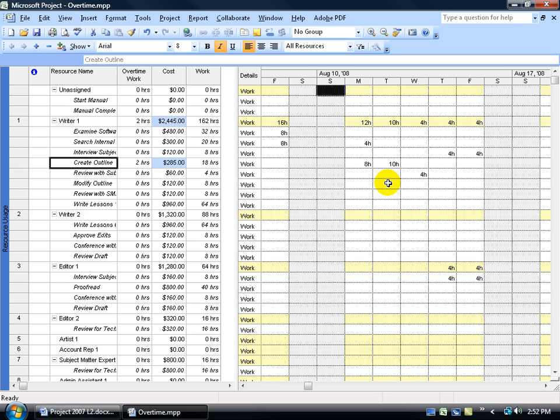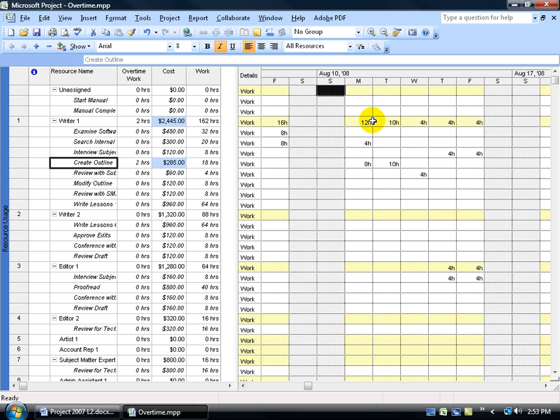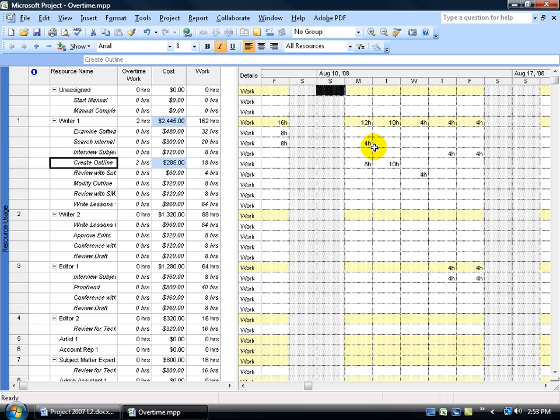You're probably wondering why does he have 8 hours on creating an outline for Rider 1, and then above that on the same day he has another task at 4 hours. That's a total of 12 hours. Isn't he over allocated? Shouldn't we give him extra overtime? Well, yes you should, except that this task I have already marked completed. If it wasn't marked completed, these would be in red, showing that he's over by 4 hours. In which case, I could go ahead and give him some overtime for this day so he's not over allocated.